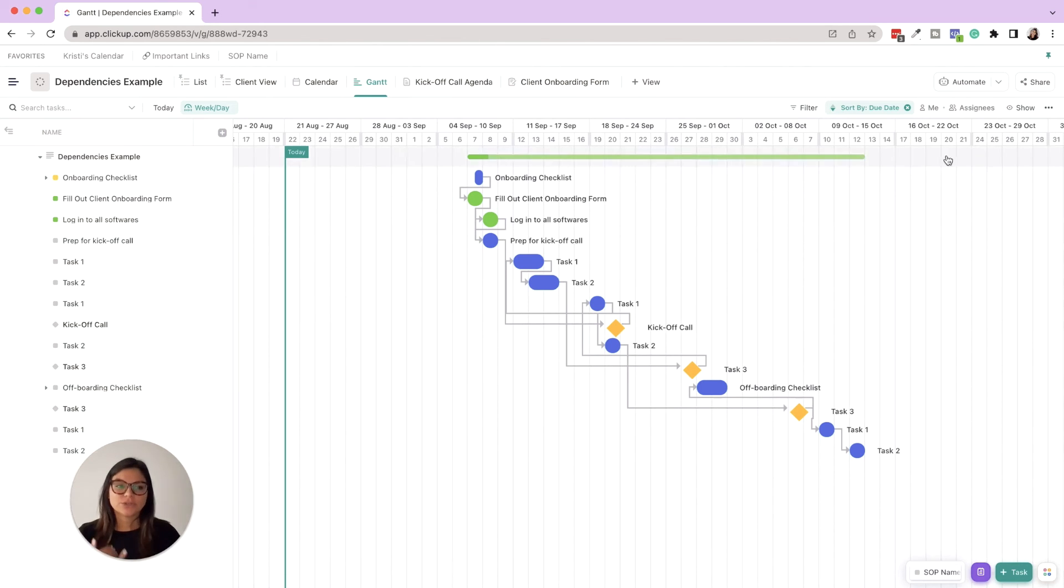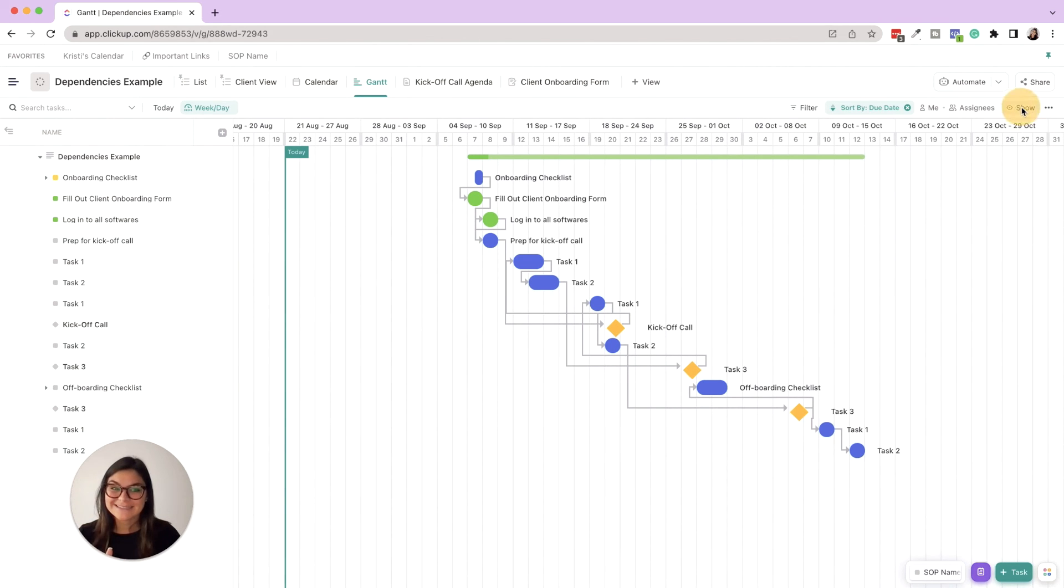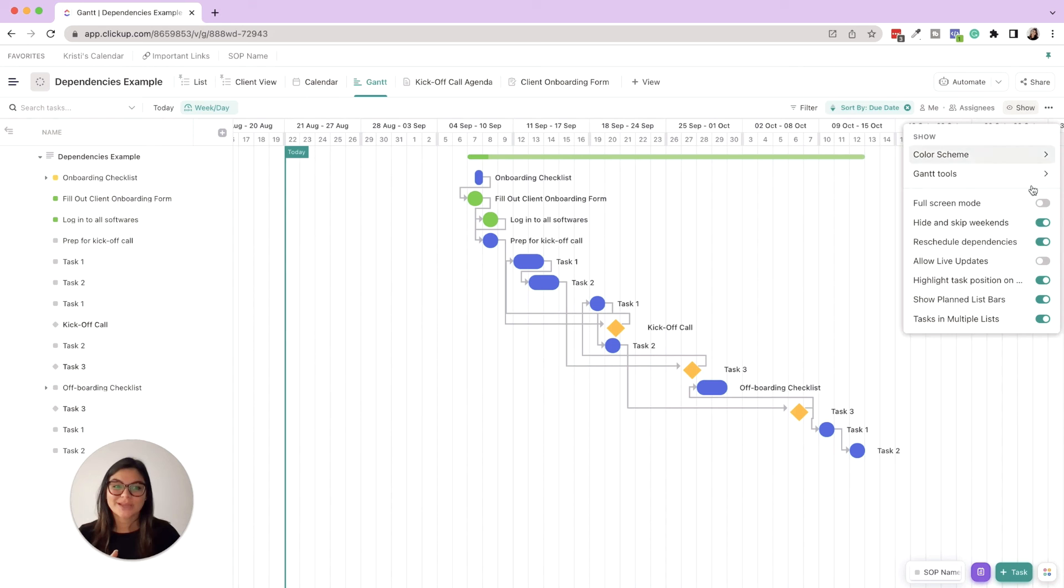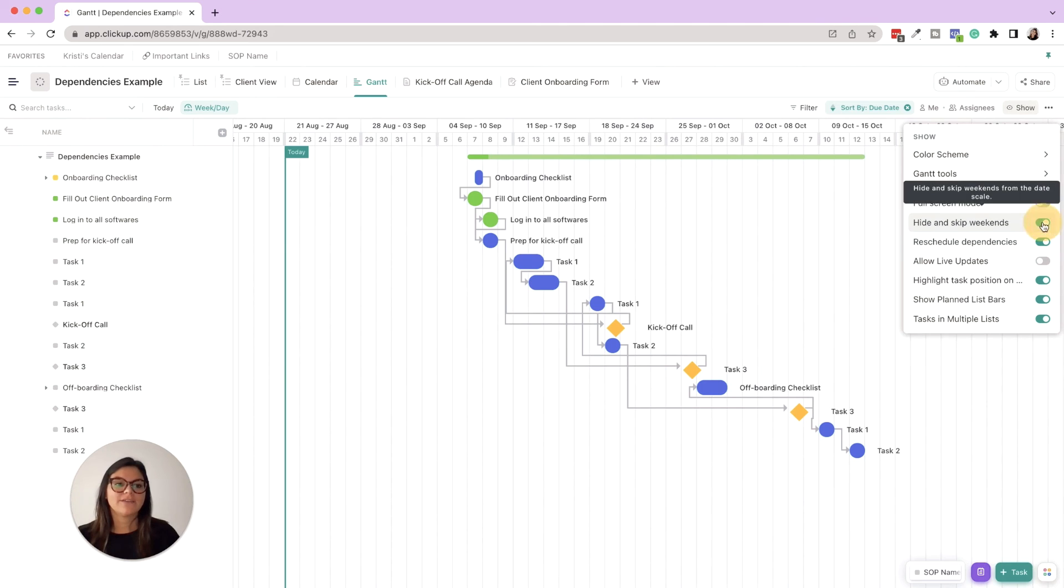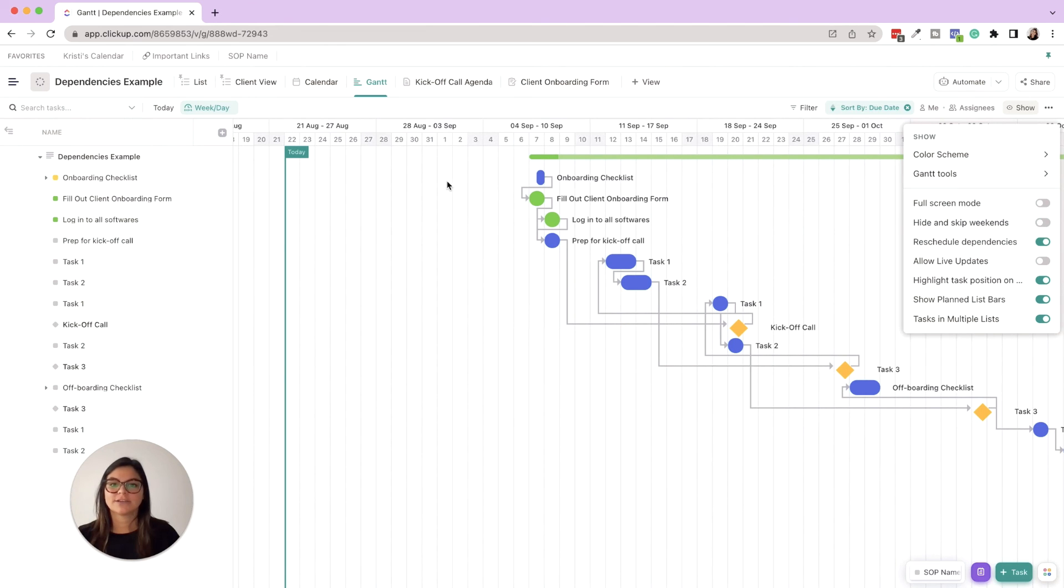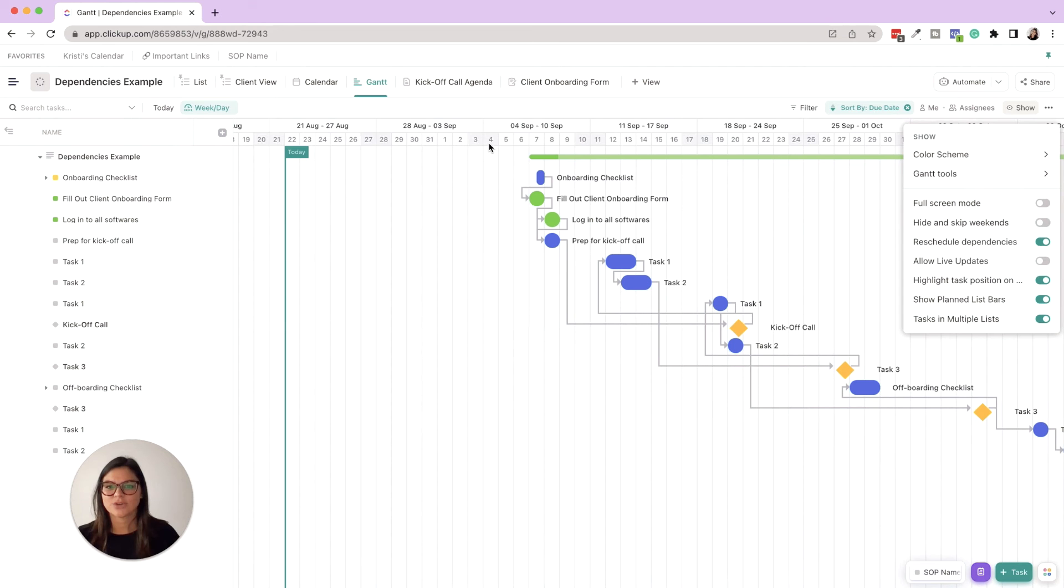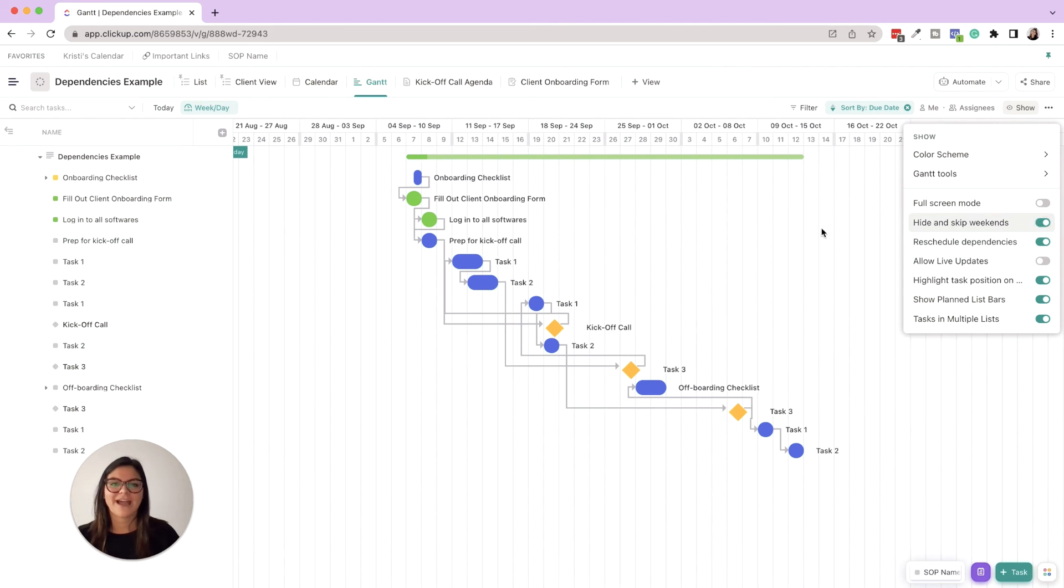But a trick in Gantt view that's really handy is say you want to reschedule everything in the same order and due dates but you want to skip weekends. That's where you can click show/hide and skip weekends. And when I'm moving this in here, it's not assigning anything on a weekend. So if you don't have that on here, you'll see it expands it a little bit and then the weekends are grayed like a darker gray, so you can see that there. But if I hide it, no problem-o, it's not going to fall on a weekend.